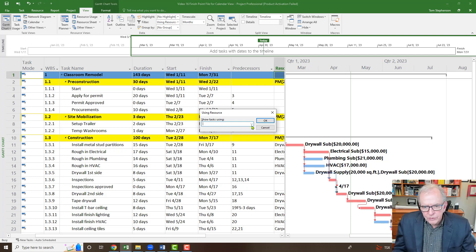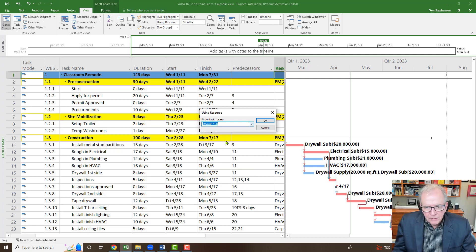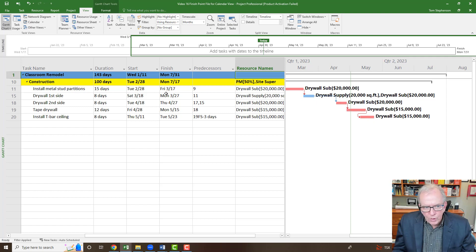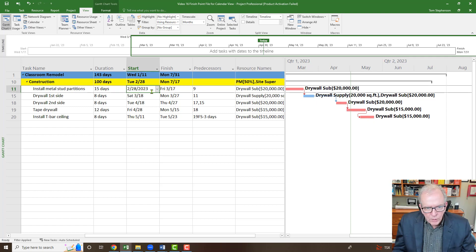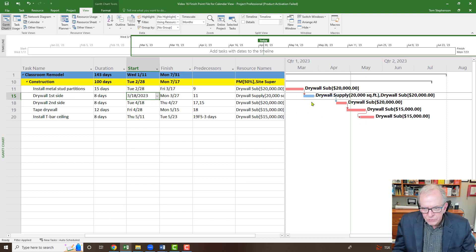We filtered this by resource for the actual drywall sub. We click OK, and we see all the activities that the drywall sub is going to be doing. So that's great. We know what activities they're going to be doing, when they're supposed to start, and when they're supposed to finish those specific activities. It looks like we've got them there pretty straightforward amount of time.